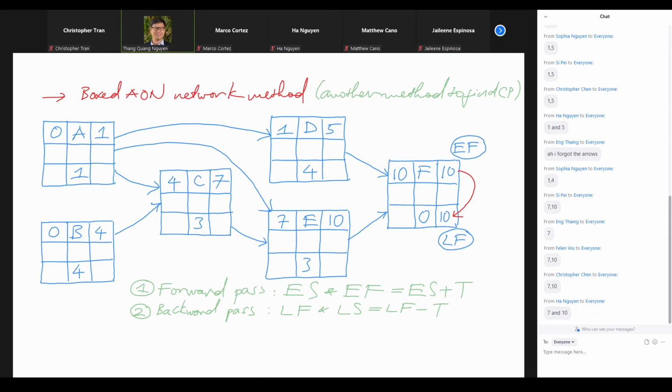Okay, so it means that they will try their best to keep the wedding date unchanged or fixed, right? So if we already know the latest finish, then we just subtract the time to know the start date as the latest.